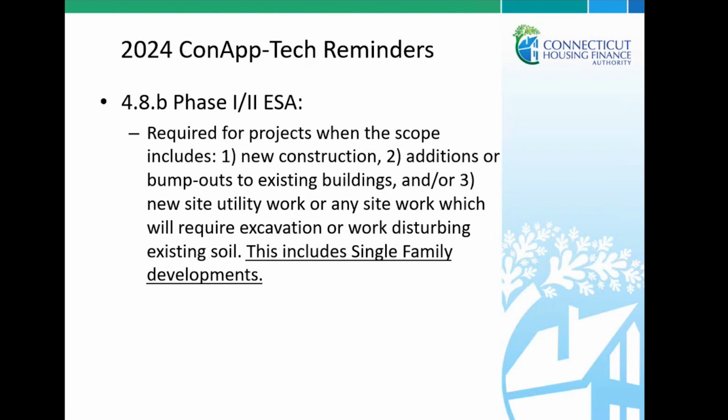Keep in mind that if the phase 1, when it's completed, does note any concerns or possible future or additional investigations, that would be considered a phase 2. And that would also be required as part of the application. We would want to see that any concerns noted in the phase 1 have also been investigated further through the phase 2. And this does include single family developments.